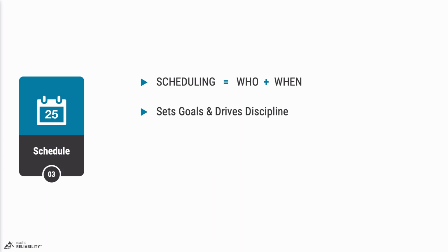Scheduling ensures that a sufficient amount of work is agreed to be done during the week based on actual and available labor capacity. Planning eliminates waste during jobs, but planning alone is not enough to get truly efficient. We need scheduling to ensure we don't waste time between jobs, that we commit to enough work, and that we remain disciplined. But scheduling is also important for coordination.